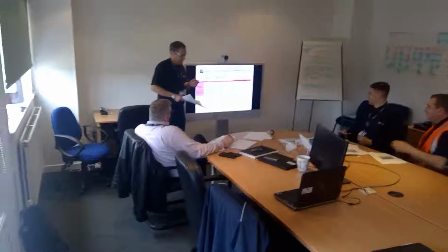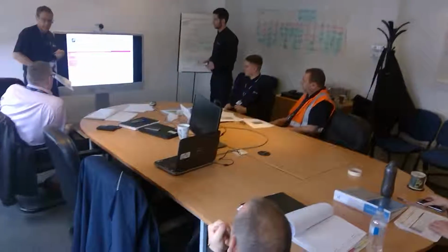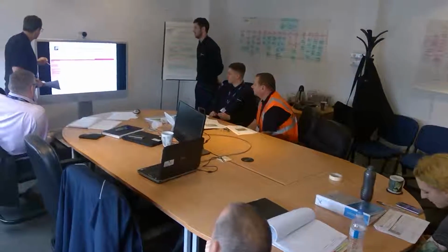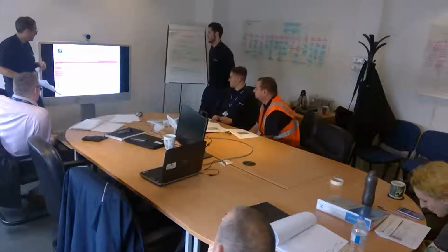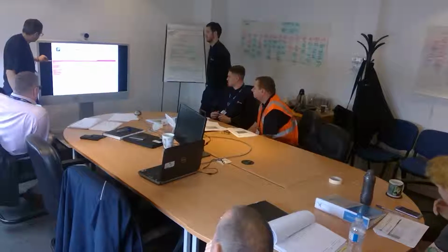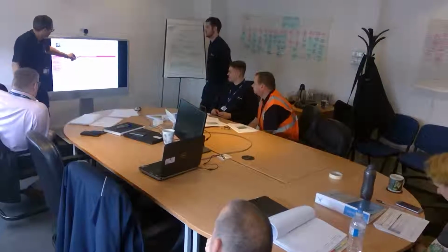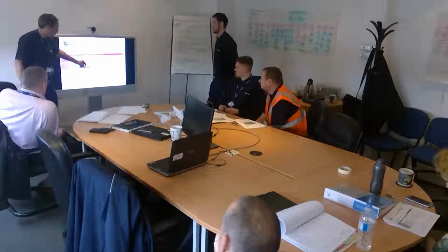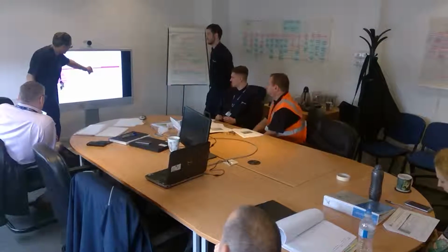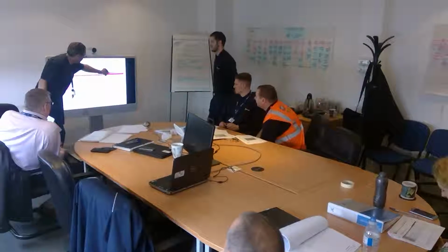So we did a bit of a case study to try and quantify what it's actually costing us to have this problem that we've identified, which is lack of information. When we have an issue, we create a table of all the different personnel involved in sorting that issue, what they do, how much time it takes on average to sort it out, and what cost it is, either material or hourly rate, and for the case study what it's actually cost us.